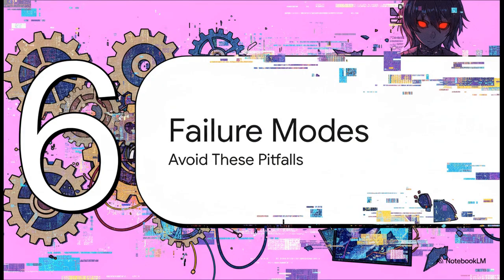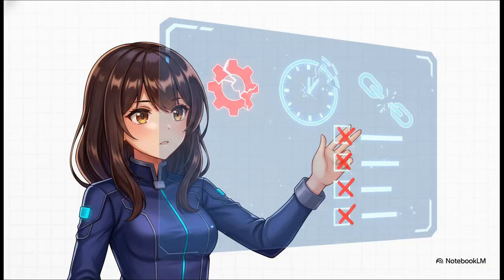And finally, Section 6, Common AI Agile Failure Modes. Picture a doomed AI project for a second. How did it get there? Usually, the team falls into a few incredibly predictable traps. It almost always starts with imposing traditional Scrum, forcing complex exploratory research into rigid 2-week boxes, which just instantly demoralizes the engineering team. That pressure inevitably leads to trap number 2, shipping to meet dates over quality, which destroys user trust the very second the bad model goes live.